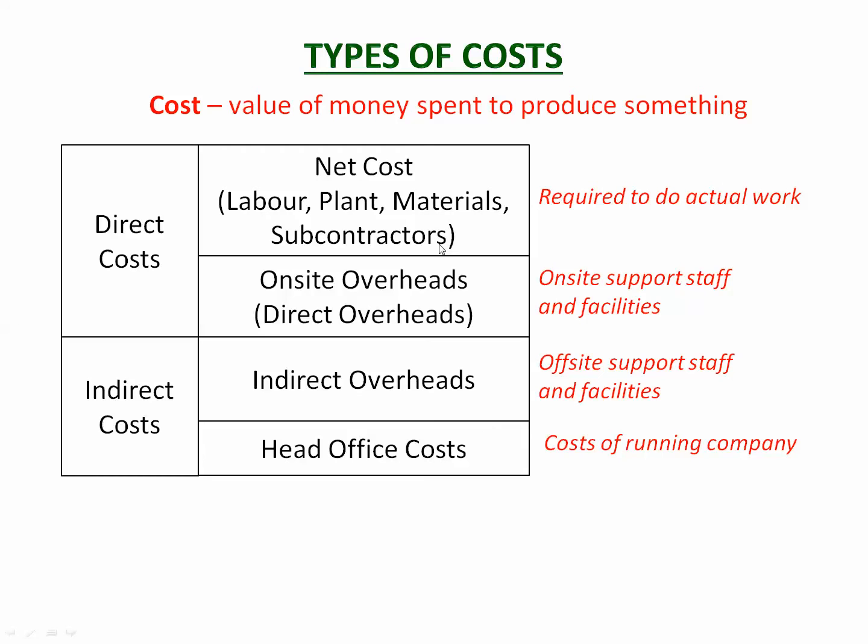So when you're doing the project, you're not just considering the actual amounts that are spent on doing it. There's those overheads and the head office costs that you also need to incorporate into the project costs.